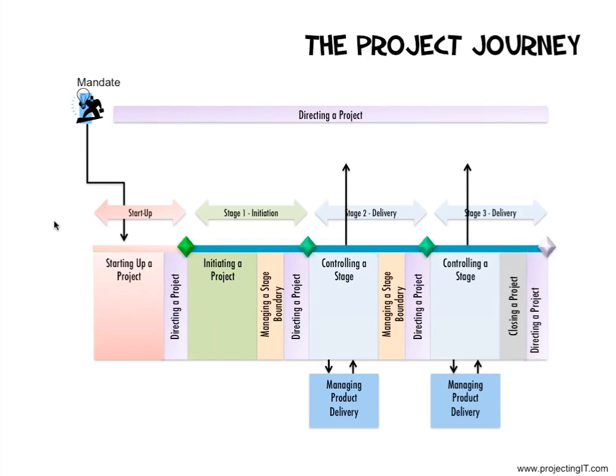Once the end project report is ready, the project manager submits the report to the project board. It is the board who will review the status of the project and ensure that the project has done all the work as agreed with the corporate, and then they will allow the project to be closed. This is how the PRINCE2 process model works.